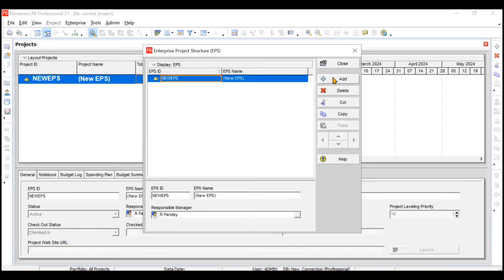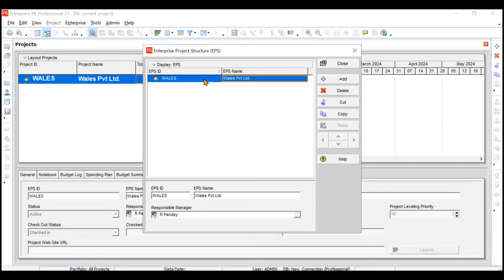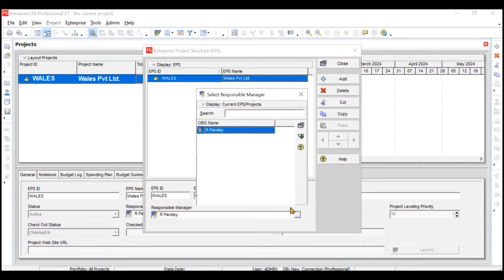We'll use the Add button to create an EPS. The first major EPS will be Wales Private Limited, which will have four sub-category EPS: Energy Services, Construction, Maintenance, and Technology Services. Give it a unique EPS ID of your choice, and set the EPS name as Wales Private Limited. You also need to assign a responsible manager to this EPS.